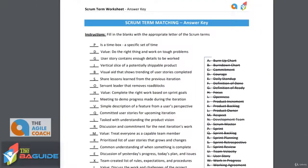The first one is: is a time box a specific set of time? As we look through the terms, the term that fits here best is sprint. Sprint is an example of a time box. A time box is something that has a set start and an end — it's a box of time that things are happening in. A sprint is a perfect example of that. The sprint is one to four weeks, and that is where all the work is being done. At the end of that sprint, we have that potentially shippable product increment ready to go.